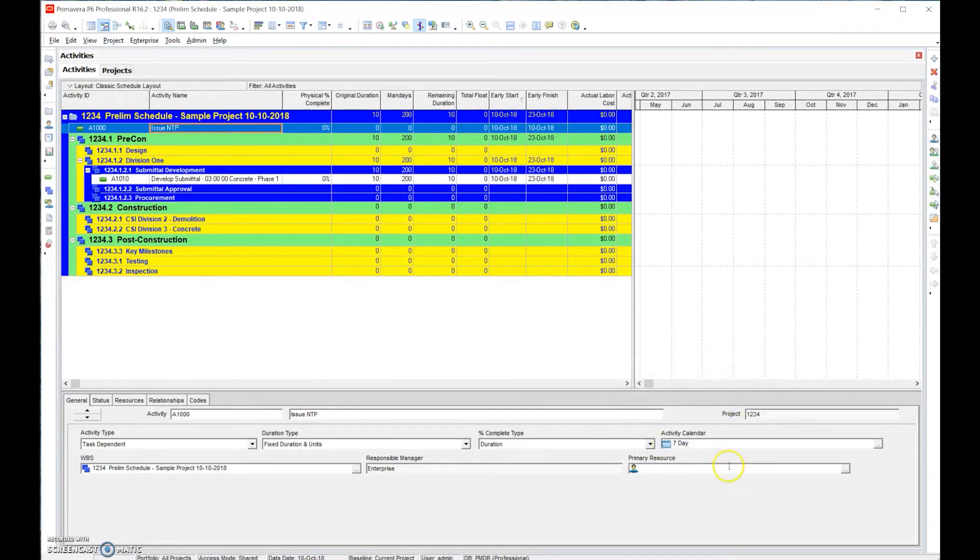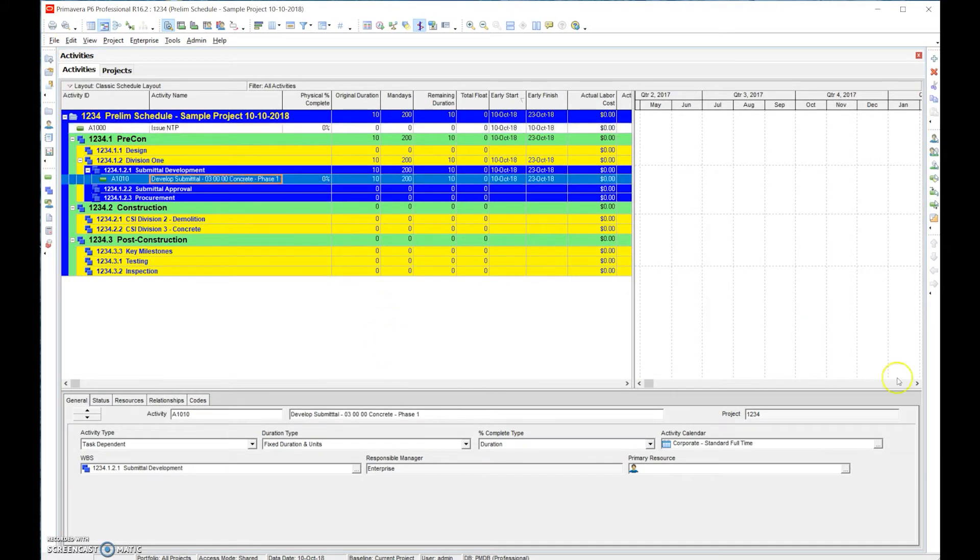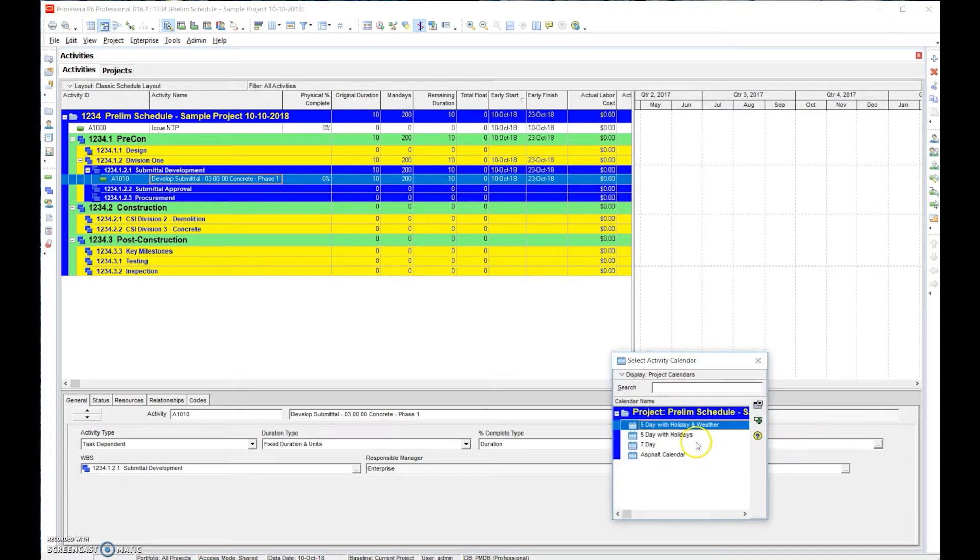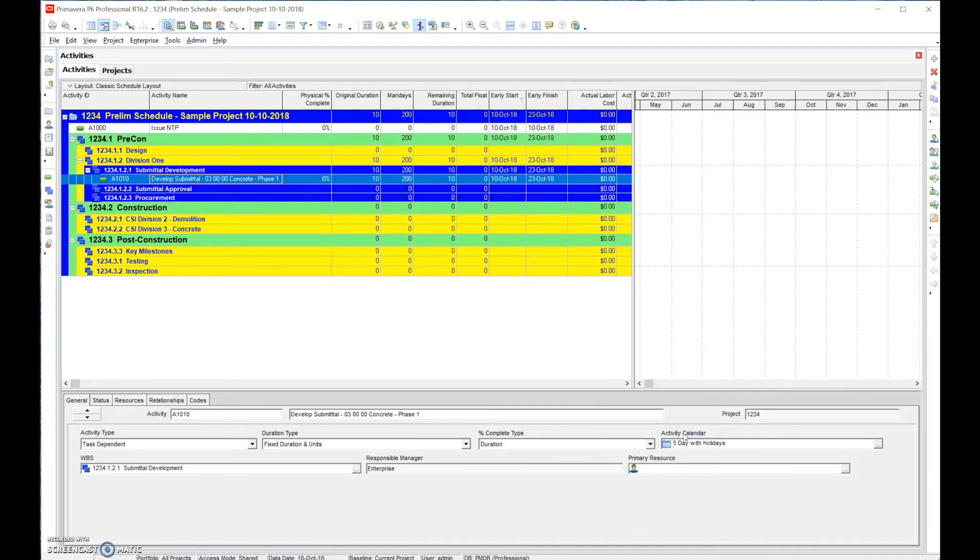We can simply select seven day calendar and it's assigned. Say we did submittals - develop a submittal. A submittal would be a five day with holidays, it wouldn't be five days holidays weather, obviously it would just be a five day.